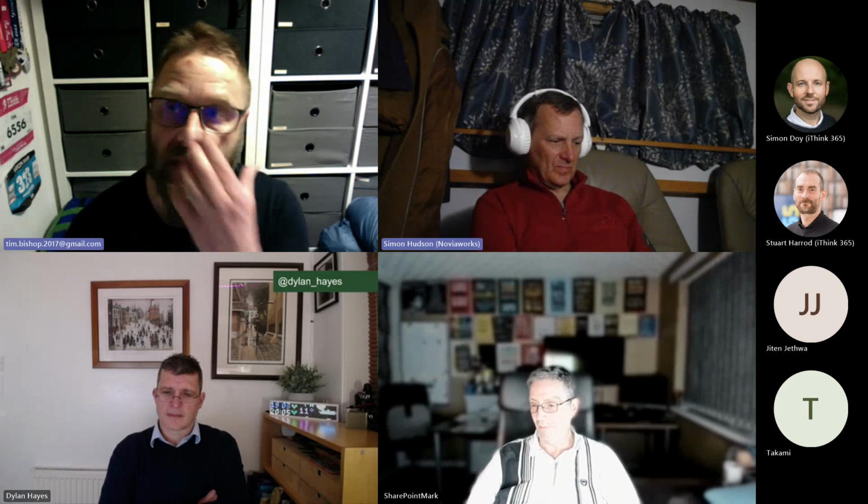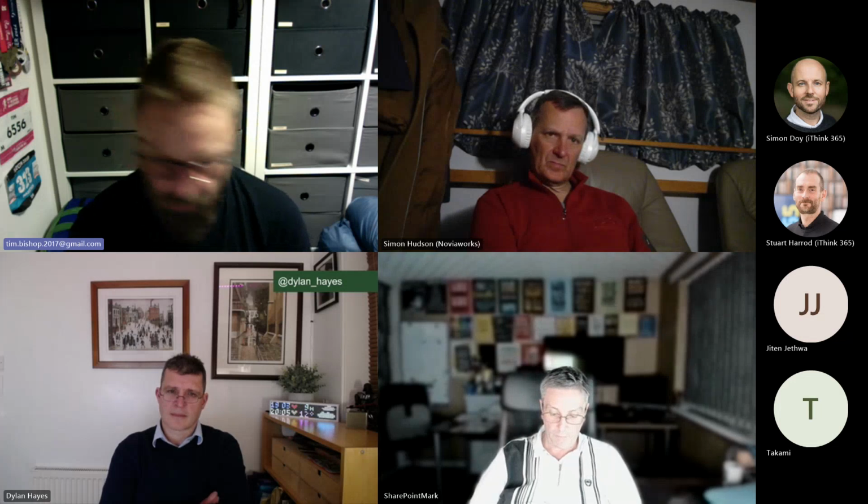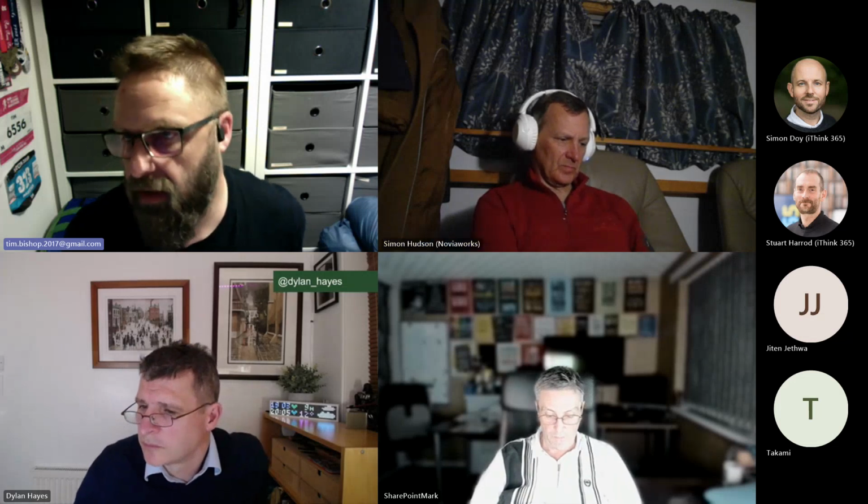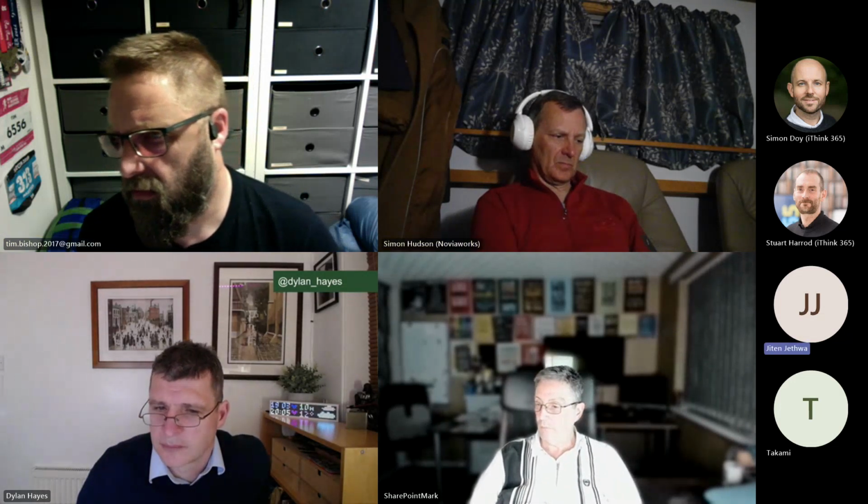So if I think about the teams in which I've worked and dev teams that I've worked for, I'll slightly rephrase your question if I may. The modal size, the size that I see most common from teams, is around about 1 to 2 days long. The smallest one I would ever expect to see would be a 10-minute job, but those are relatively infrequent. Does that answer your question? Yes, it does. Yes, thanks.